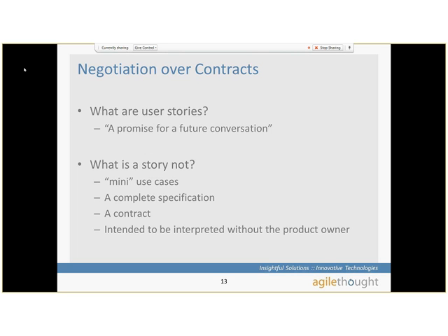I highly recommend things like, we've done things in the past like test creation sessions where the product owner, the tester, and the developer get together. They agree on the tests that will be run. If you have this acceptance criteria set up correctly, and you do some sessions like that, it's going to be real easy for you to create tests that will tell the developer when this user story is complete. So that's why we need that product owner in there, so they can tell you, hey, this is going to be complete.